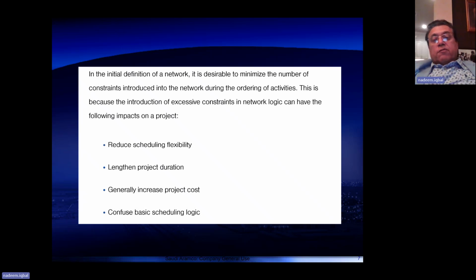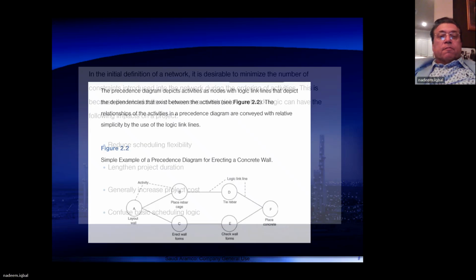So you have to be careful in putting different types of constraints, excessive constraints, because it will impact the scheduling of the project. If there are more constraints, then it will reduce the scheduling flexibility.